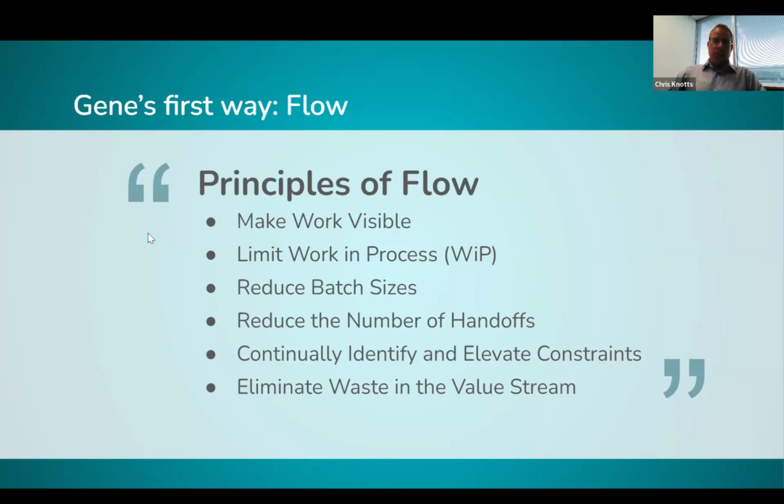Reducing handoffs. I think that's probably pretty self-explanatory. Continually identify and elevate constraints. What does that one mean? That means you don't really have to think about solving all of the problems in your system. You just need to be able to identify the biggest problem in your system. And then when you elevate that constraint or challenge or problem, you're making that the most important thing to solve. And this is, again, a little bit oversimplified, but in some ways it could potentially be a real waste of time to even work on solving any of the other problems until the biggest problem is solved, because that's your biggest bottleneck. That's your biggest constraint. So that's what that means.